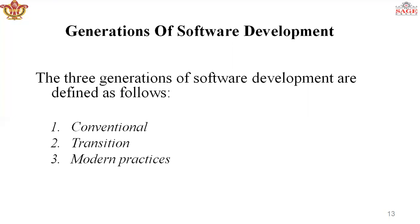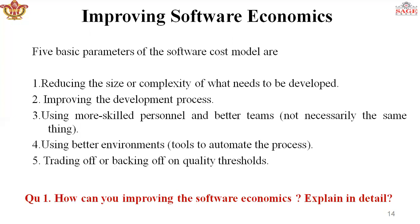Now we discuss improving software economics. There are five parameters for improving software cost models: first, reduce the size or complexity of what needs to be developed; second, improve the development process; third, use more skilled personnel and better teams; fourth, use a better environment to develop software; and fifth, trading off or breaking the quality threshold.